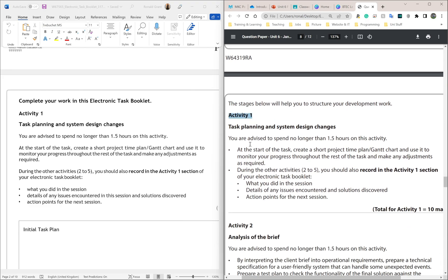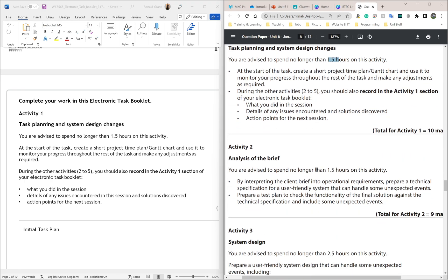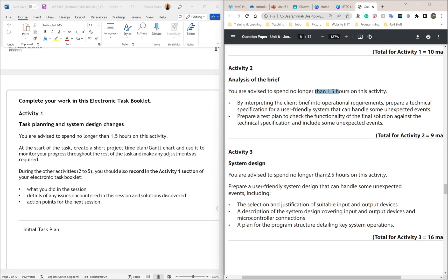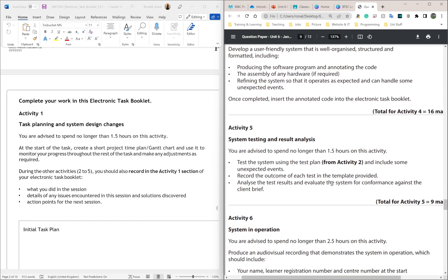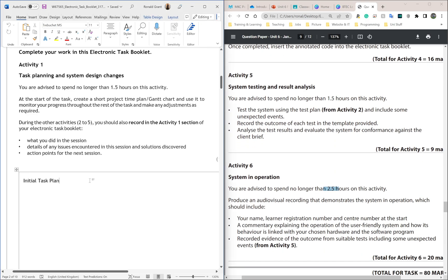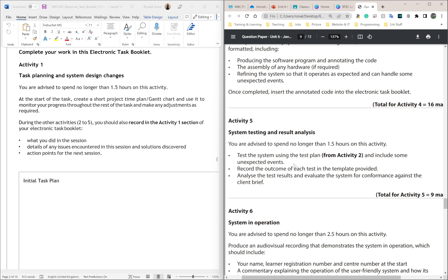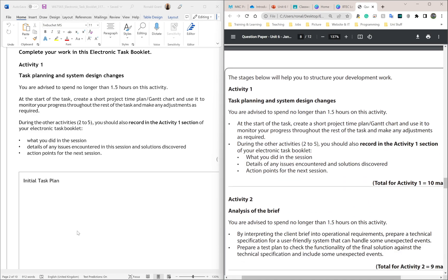The only thing we need from activity one at this point is the time. It says you are advised to spend no longer than 1.5 hours on activity one. Activity two is another 1.5 hours, activity three is 2.5 hours, activity four is 2.5 hours, activity five is 1.5 hours, and activity six is 2.5 hours. There are a couple of ways to do this — I'll show the way I prefer.